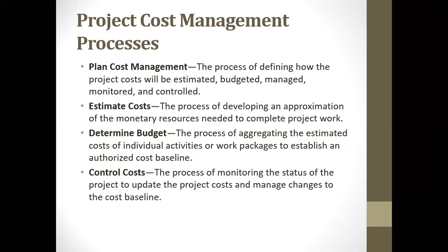Now, in estimating cost, we are dealing with the approximation of each of the tasks, the financial implication of each of the tasks. At determining budget, we are running an aggregation, a summation of all of those individual costs to make up the budget. Now, importantly, it is good to know that we only raise an estimated budget before the project starts. We can only define actual cost spent in a project after the project has been completed.